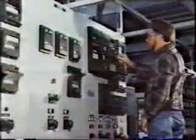Usually for test purposes, a test plug can be inserted at the base of the relay and sometimes also at the top of the relay. These boards effectively isolate the incoming circuits from the CTs and VTs. Apply a short circuit to the CTs and apply injection test current to the relay. On some other types of relay, the same result is achieved by switches at the base of the relay.